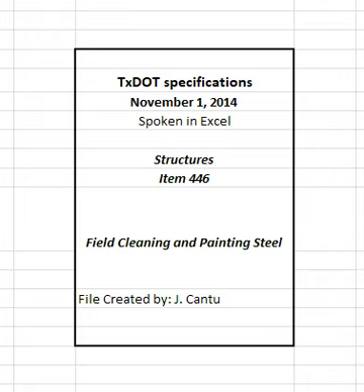6. Payment. When this item is specified as a pay item, the work performed and materials furnished in accordance with this item and measured as provided under measurement will be paid for at the price bid for cleaning and painting existing structures, cleaning and painting existing railing, or cleaning and painting existing piling for the system specified and, when paid by each, for the structure description by reference number.